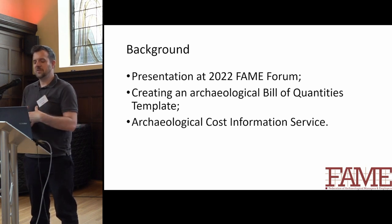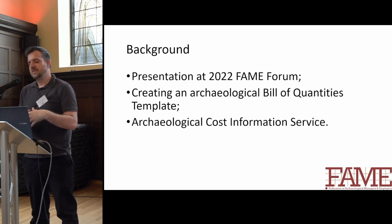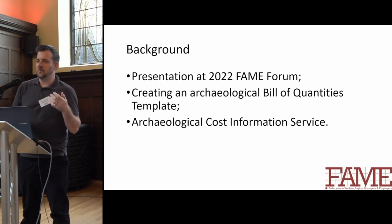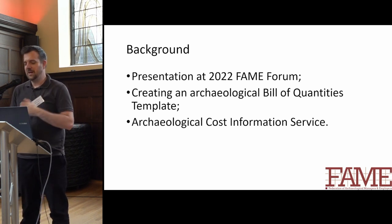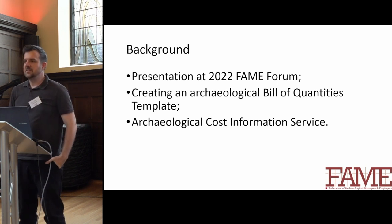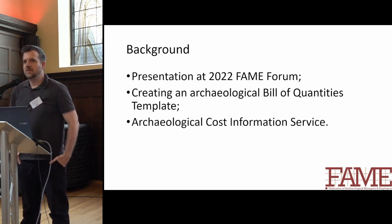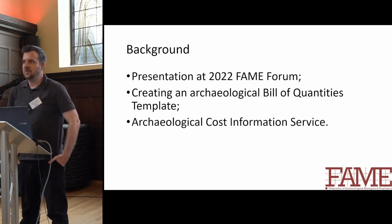For those not familiar, a bill of quantities is a slightly different way of billing. So instead of billing by a fixed amount, you bill by items and quantities — the number of trenches, the number of post holes you dig. So what we're doing is creating a framework to allow archaeologists to do that. A cost information service — there is the one done by Ricks, which is now spun out into its own company — is essentially gathering together a range of costs on those different items.